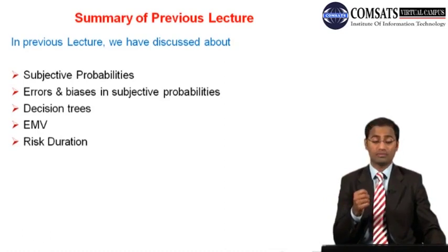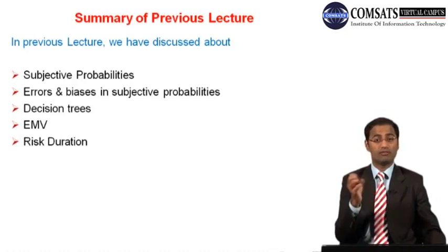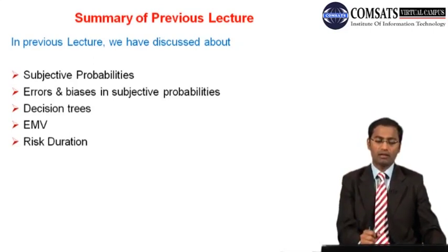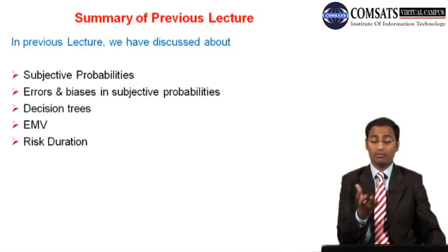And then we had talked about subjective probabilities. How do we actually carry out such a method? We use the Delphi technique: experts are sitting, and we are collecting the data and making a statistical analysis. Then we share our statistical analysis results with these experts, and we want them to revisit their opinions. Then we talked about the limitations of the Delphi technique and subjective probabilities, and one disadvantage of the Delphi technique is that it is a bit time consuming.